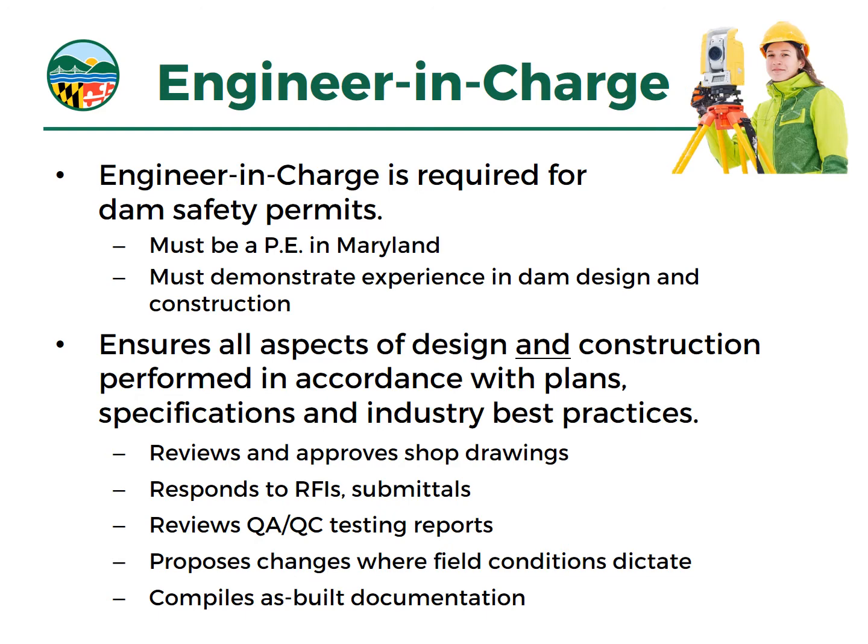That person should be a registered professional engineer in Maryland in good standing, and we will ask for a resume of experience to demonstrate that you've worked on projects of similar nature for dams of similar height, design, hazard classification, and age too. Now, that engineer in charge works from the beginning of the project through the end of the project, so they're really ensuring that all aspects of design and construction are performed in accordance with the plans, the specifications, and industry best practices.